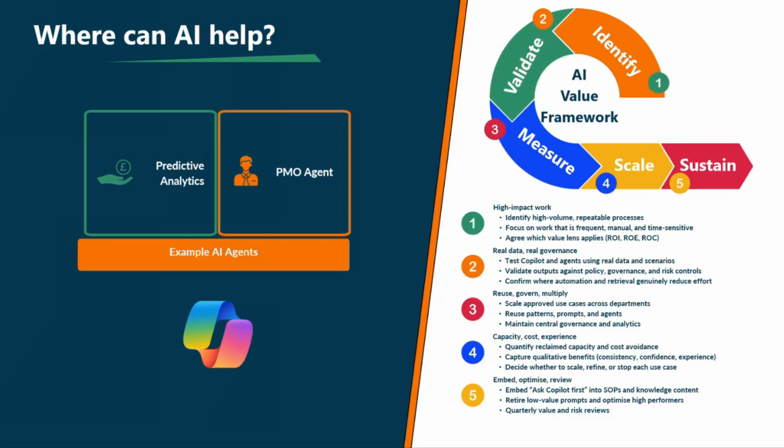Actually, across these 5 projects, they've all raised risks around this particular resource or this particular availability of a piece of technology. Therefore, I predict you might start to get some issues on these projects moving forward. You might want to do something about it in advance. And you'll get instant answers from grounded data that exists within your solution.